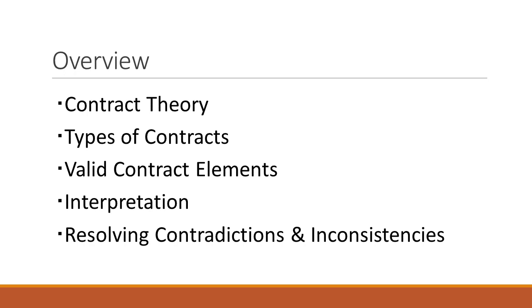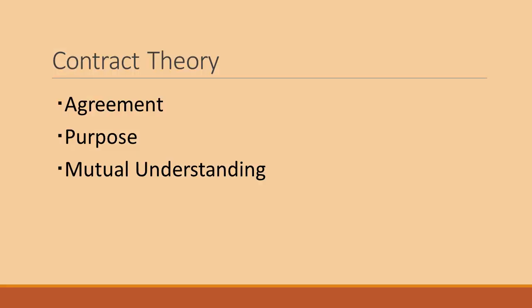When you first get into a project and your initial work, you're going to create a scope of services identifying, okay, we're going to be designing for you a house or a factory or a hospital, whatever the project might be. And you'll identify, we're going to do schematic design, design development, construction documents. You can do the various scopes of services to get a set of drawings and specifications completed to build a building. That description is going to be part of your contract. And there'll be negotiations between your company that you're working for and the owner, and the relationships between the parties will be defined in the contract. And that'll be for every project.